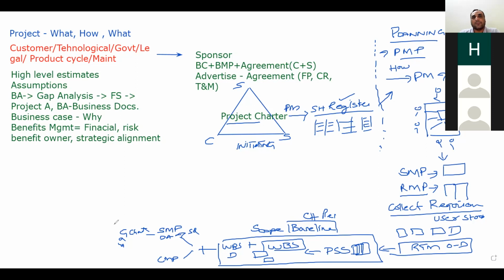The project manager only gets the amount of the cost baseline. Management reserve stays with the client or with the PMO or with the organization, and can only be released when there is an uncertain situation, with the help of a change request. You will also issue the project funding requirement, how you need the funds. So that's how the cost baseline is also issued.